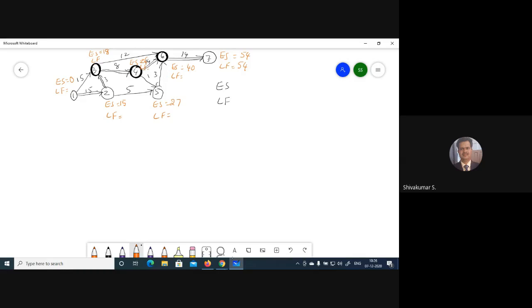So 54 weeks. Next coming to event 6, that is 54 minus 14, it is 40. Next, back to event 5, that is 40 minus 3, it is 37. But here, 40 minus 14, 26. So here 26 comes to event 4, 26 minus 1, 25 here.